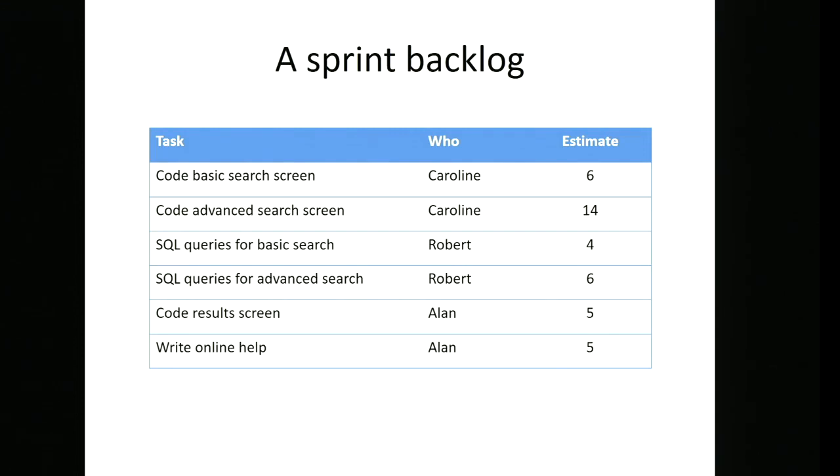If you've got somebody who's a very experienced software engineer and they've been in the team for 5 years, and you've got a trainee who's just joined and has no idea what's going on and hasn't used the systems before, then, if you're defining a story point as an average amount of work that you can do in an hour, an average of the team, it makes sense for a more experienced developer to take on more story points than a less experienced one.